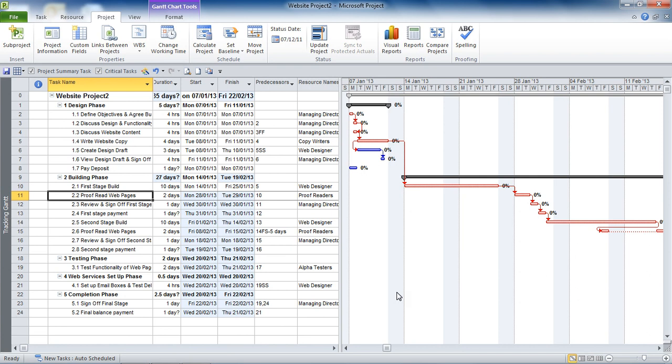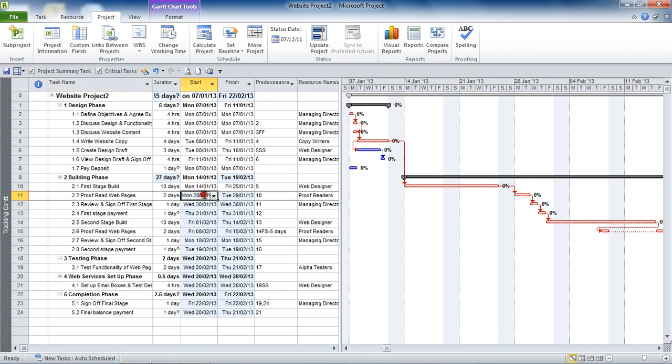Now one way that I'm going to put a constraint in immediately here, and I'm going to use this proofread webpages task as an example, is I'm going to change the date of this task. Now this is bad news really with auto-scheduled tasks. We know that in Project 2010 you have two task modes: manually scheduled tasks where you can enter fixed dates, and auto-scheduled where Project calculates the dates for you. So if I was to change the start date of this task, Project will create a constraint. Let's have a look at that to begin with.